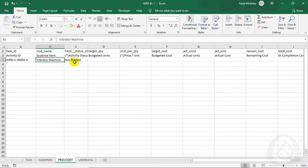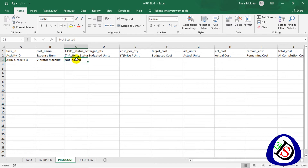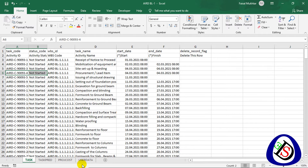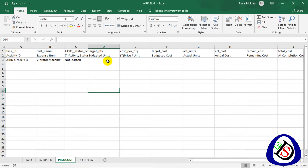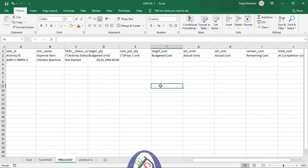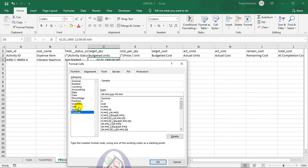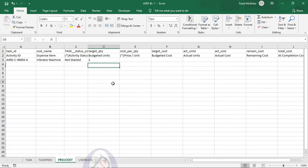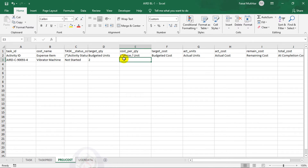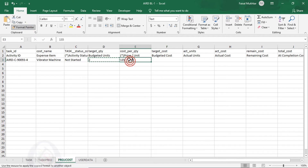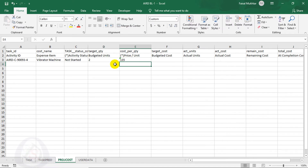The activity is Not Started — we are doing the schedule before the project starts, so the status is 'Not Started,' matching what is shown in the tasks. For Budget Units, I enter how many vibrators are required — I will write 2. I right-click, go to Format Cells, set it as Text, and confirm. For Price Per Unit I enter $135 per day.